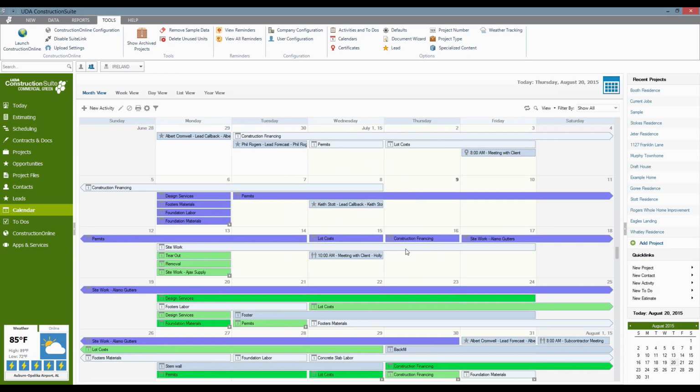If you use a lot of subcontractors and you want to see where the subcontractors are going to be working at any given point, change the activity titles around to be activity name dash resource in this case, and you'll be able to see where all of your subcontractors are working at any given time. So again, the idea here is to give yourselves these settings so that you can easily see at a glance who's going to be working on what, when, or where.